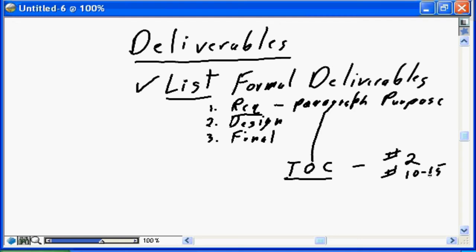If in section 2, the evaluation of the current situation, you're telling the business it's going to be 10 to 15 pages long, that, in my mind, says it's a fairly high-level review of the current situation. If you can summarize the current situation of a business in 10 to 15 pages, you are certainly doing a summary, where if the business was expecting a detailed evaluation of each and every function and each and every process in the current situation, their expectation would be that section of the deliverable would be 75 to 90 pages long.